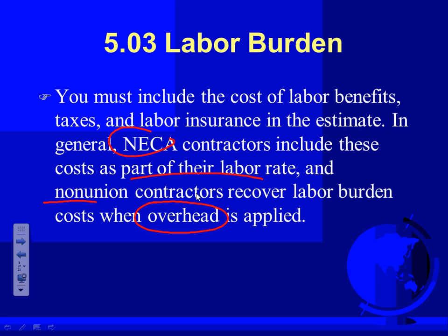If you're paying your apprentice $35 bring home, and how about $10 for benefits, right? So that becomes 45. So you have to accommodate for the benefit that you give your employees. If you're a union shop, guys, you package $67 an hour per journeyman. That's it. That includes everything that you pay on them.